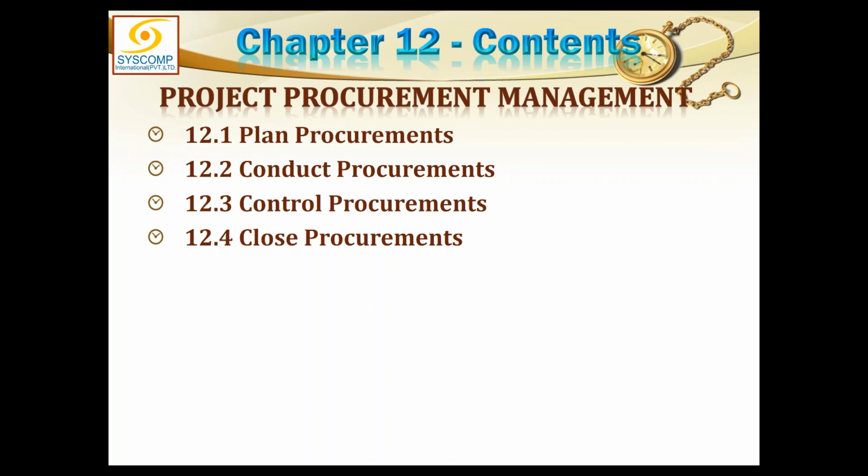So once you have prepared the statement of work, you will then decide what kind of procurement you want to do. There are a number of procurement documents. You will select the appropriate procurement document or documents for this specific case and then prepare those documents. And those documents could include a RFP or RFQ or expression of interest or whatever. So there is a long list of the procurement planning documents. So you will prepare those documents